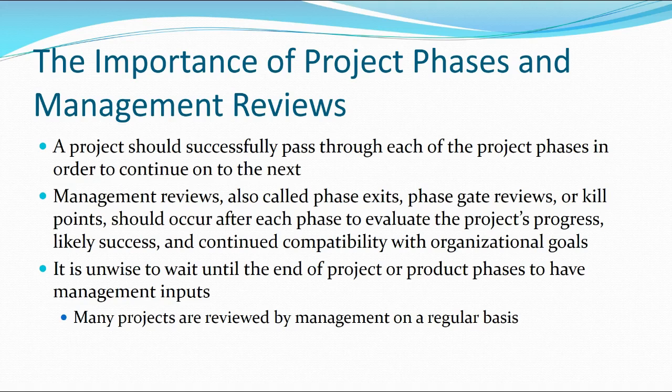That all being said, if you've got management who are involved in your projects, I would involve them more frequently than just at the end of phases. By the end of a phase, there's no more time to make changes within that phase. If you get to the end of a project phase and report out to management you're $50,000 over budget, the first comment from management might be, why didn't we know about this? So again, to quote our slide, it's not wise to wait to the end of a phase to bring up a problem.